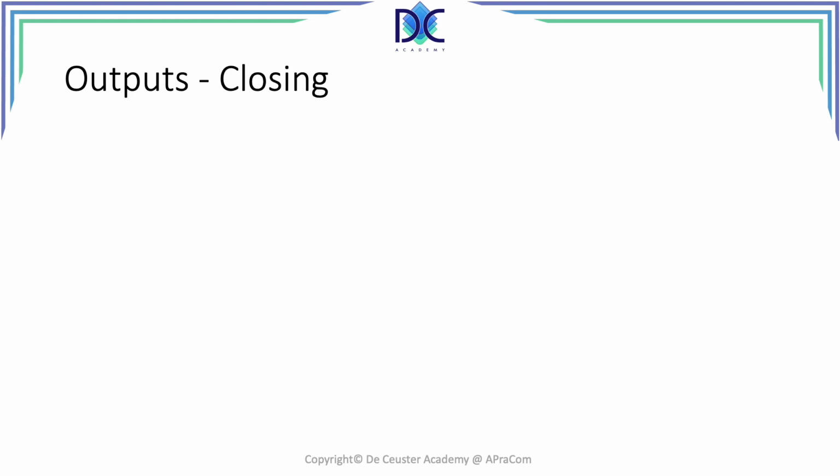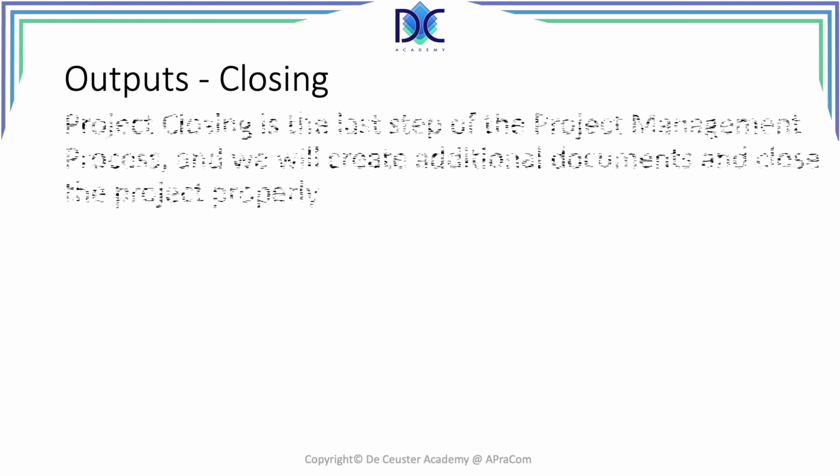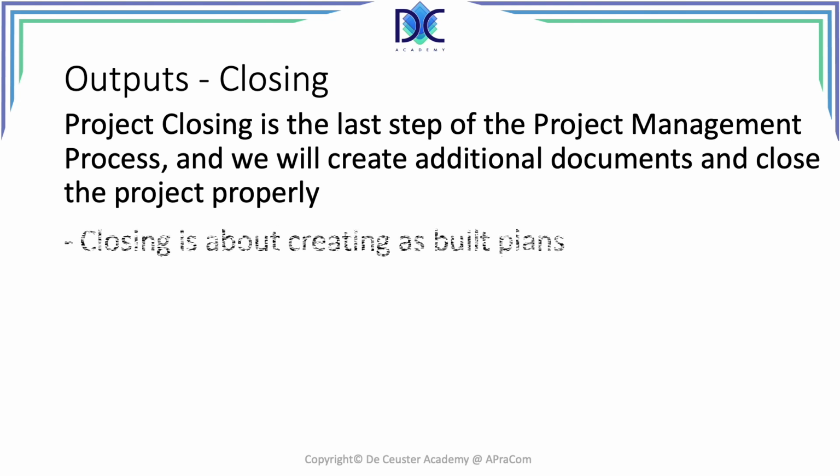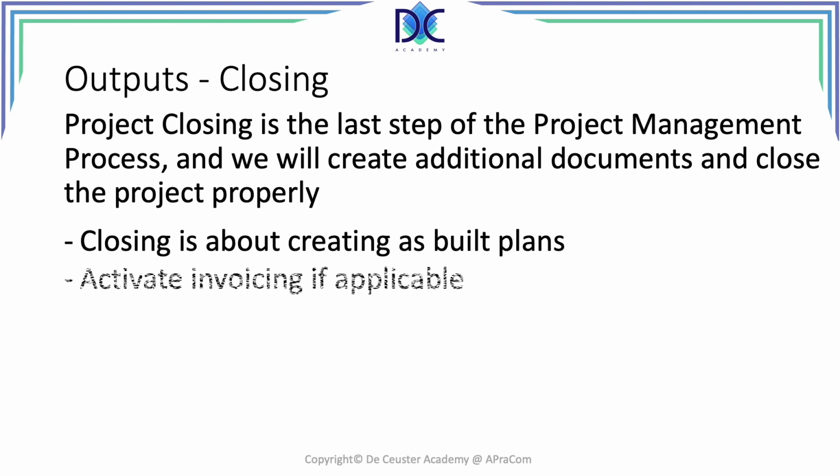The next thing is about closing. Closing is the last step of the project management process, and we will create additional documents and close the project properly. It's a very important step. It's also about creating the as-built plans. It's activating the invoicing if applicable. It's very important.